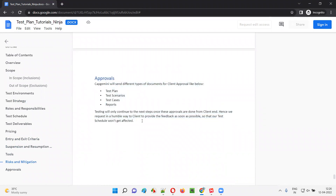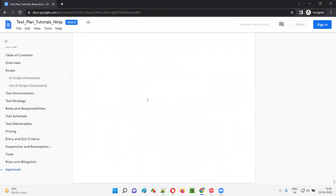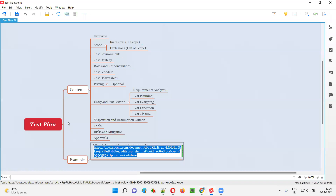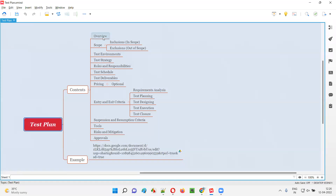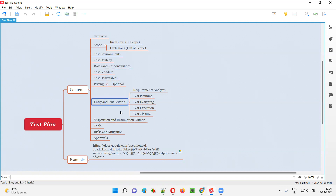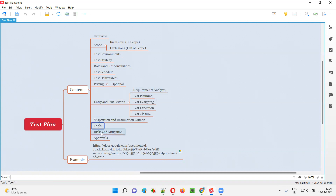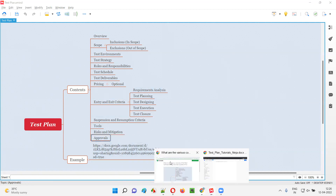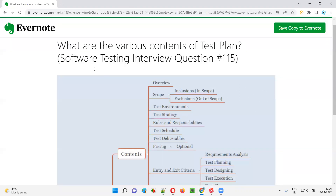What is the approval process between the client and the project team? So these are the different contents of a test plan document — overview, scope, test environments, test strategy, roles and responsibilities, test schedule, test deliverables, pricing (which is optional), entry and exit criteria for each and every phase of STLC, suspension and resumption criteria, tools, risk and mitigations, and approvals. Hope you got the answer for this question. That's all for this session. In the next session, I'm going to answer another software testing interview question. Till then, see you. Bye.